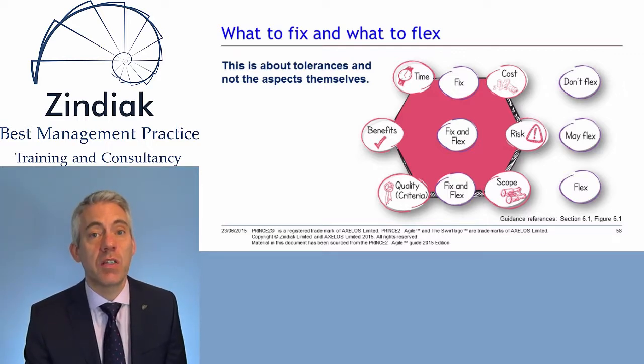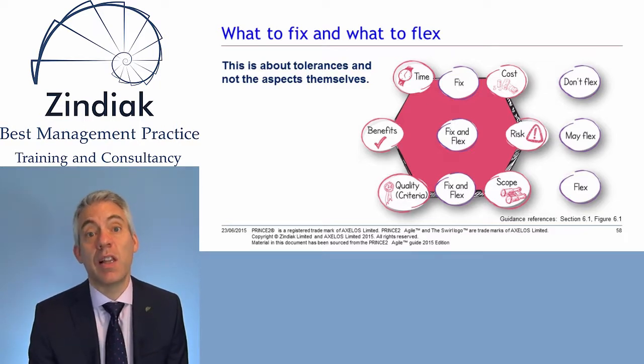I should specifically mention risk. Some people who work in purely agile environments believe that agile removes risk. Perhaps because the things that are uncertain are supposed to be uncertain, i.e. how many products off the sprint backlog you're actually going to deliver in a sprint is uncertain. It's designed that way, so they don't view it as risk. But there's still uncertainty within agile projects that aren't built in. So in a simple example, if you've got 6 people on your development team and you're doing a 4-week sprint, there's still the risk that one of your developers is unavailable. They're sick. They leave.